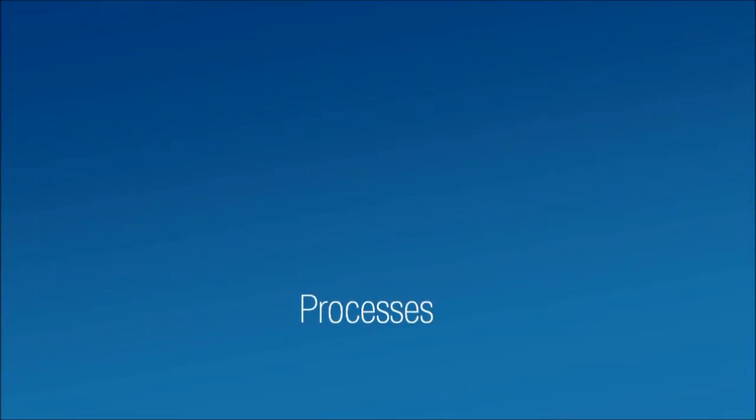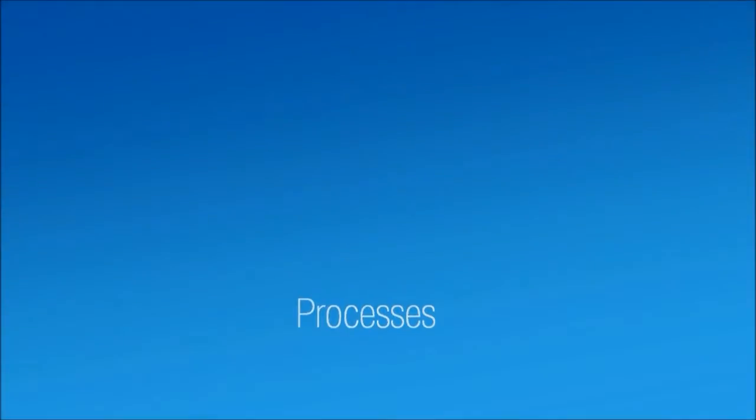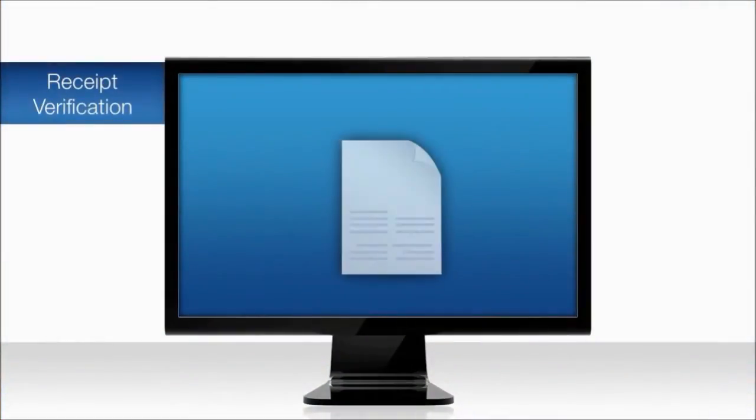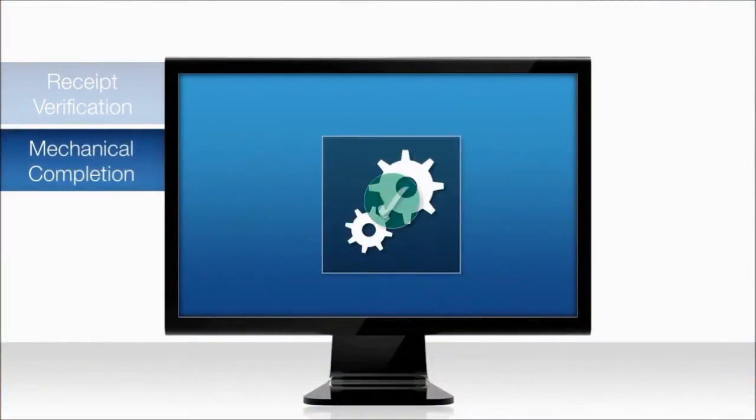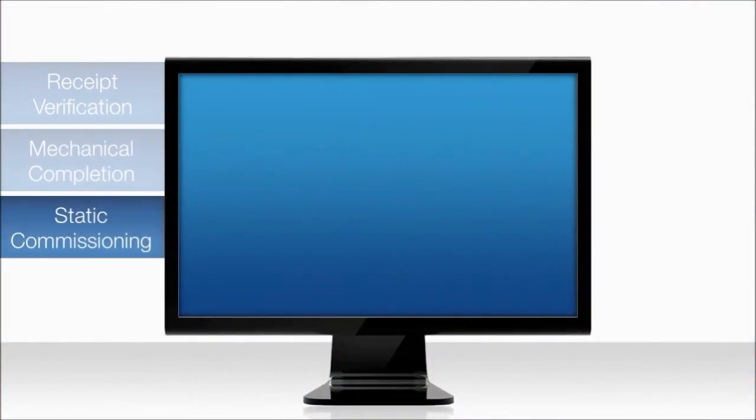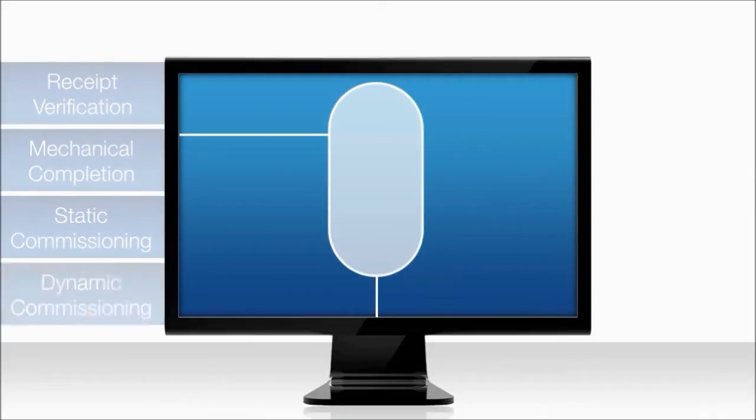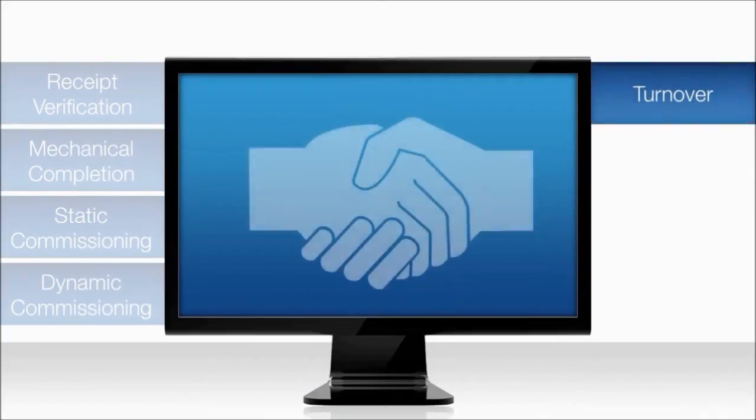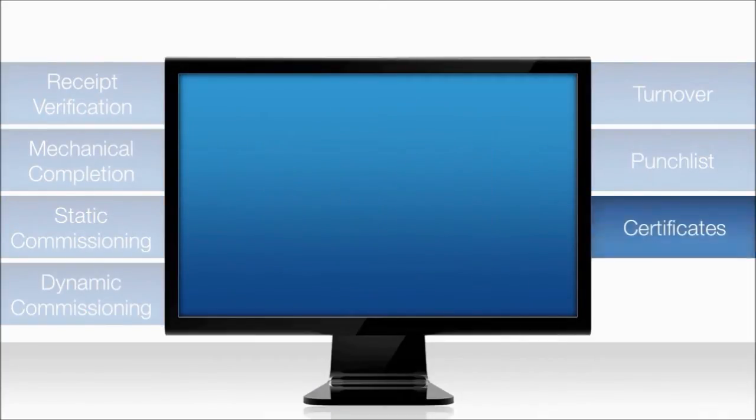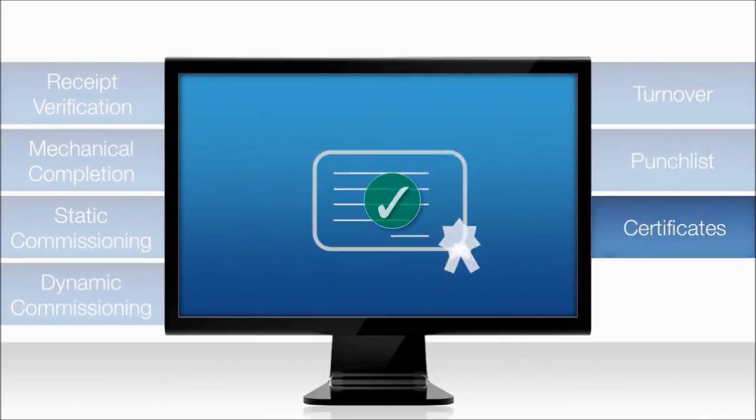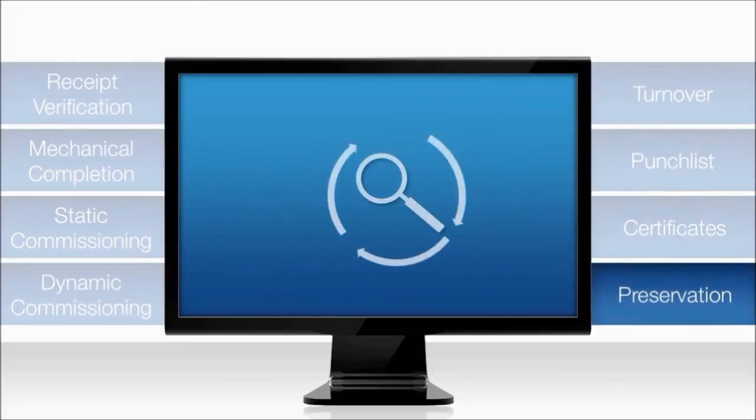Systems completion involves several complex, interrelated processes, such as receipt verification, mechanical completion, static commissioning, dynamic commissioning, turnover, punch list management, certificate control, and preservation.